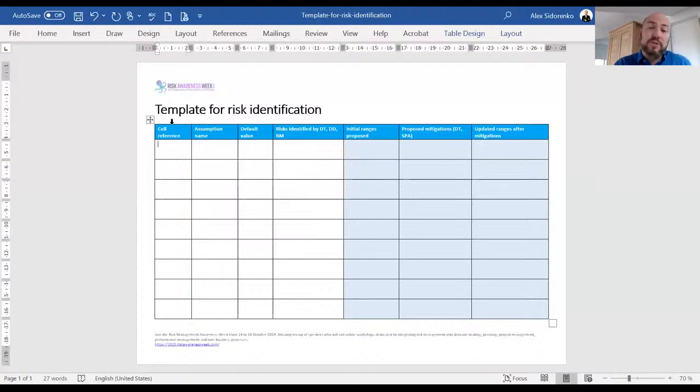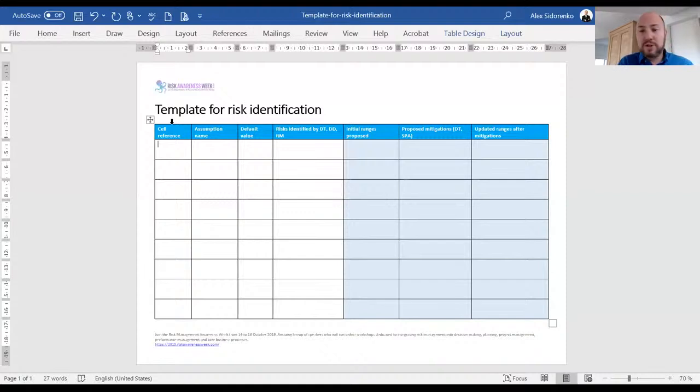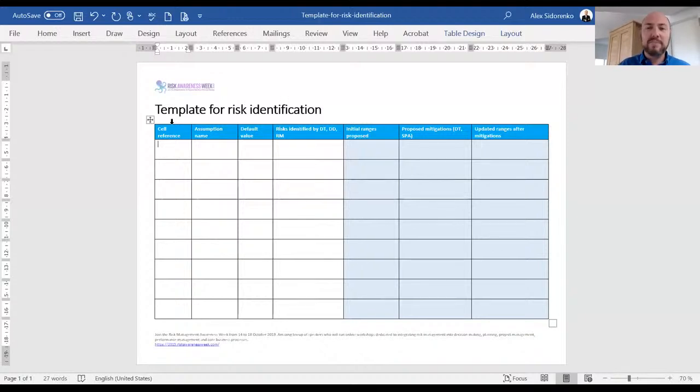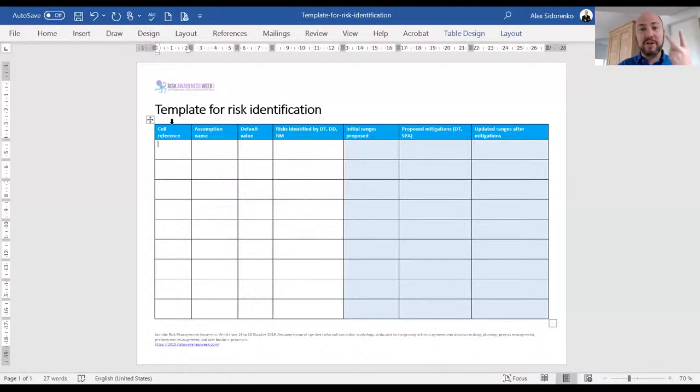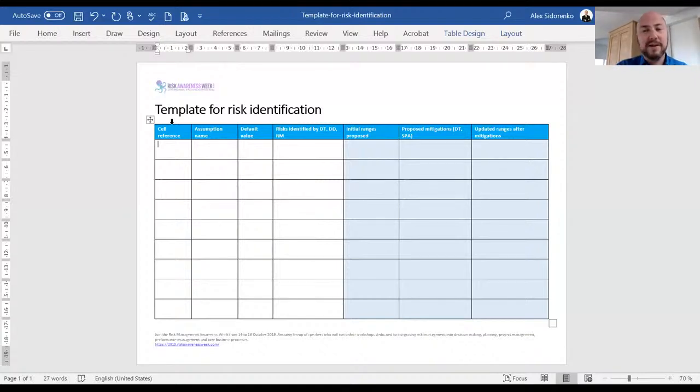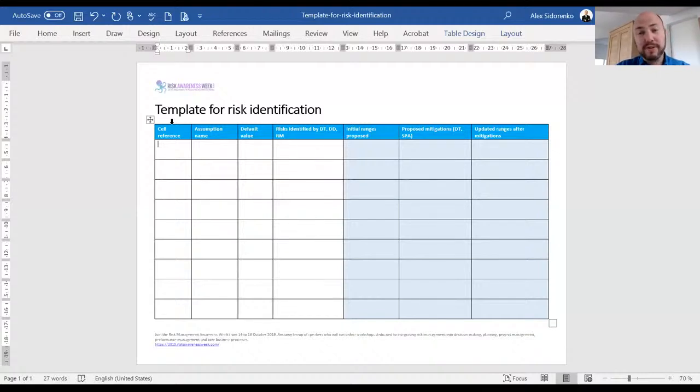The financial model usually, or a project schedule, or some other representation or calculation where that decision has been scoped or measured or evaluated. Before you can even begin, we haven't even mentioned the word risk yet. You first have to understand the decision, break it down and drill down to each assumption, and then you list out all the assumptions. This is what the first column is all about. It's listing out all the assumptions that are significant for a particular decision.